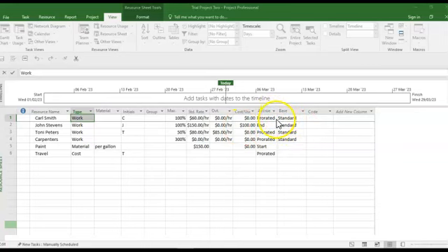In accrue is how is the payment made. All right, now you have a drop down. You can pay at the start, like if you buy material, when you buy the paint, the store is not going to let you leave without you paying for it. So that will be at the start, prorated as the project proceeds, if it's a weekly fee, a weekly payment or whatever have you, and at the end, if the person says you can pay me when I am finished.